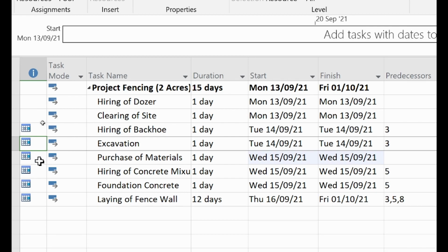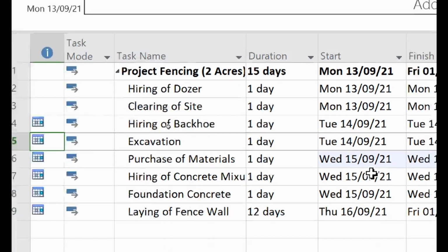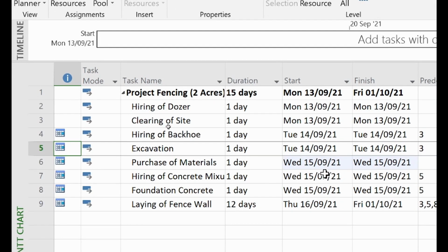So I think when I click the level, or some few changes have been made, so the purchase of the item has been moved to 15th, right? Good. And because that particular worker or engineer, so the system has done the leveling. So for now, let's leave it that way. We'll come back to it.